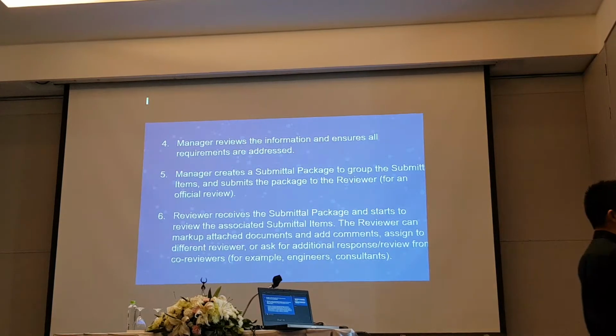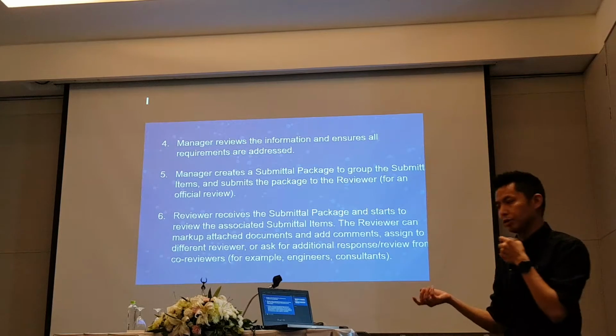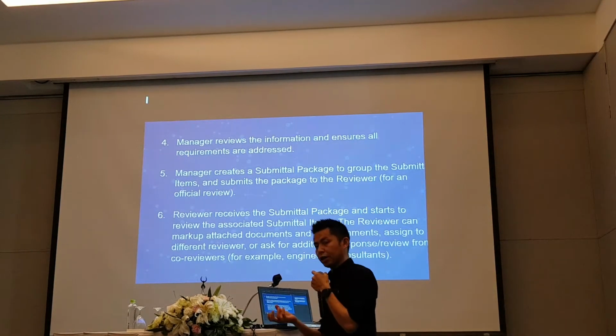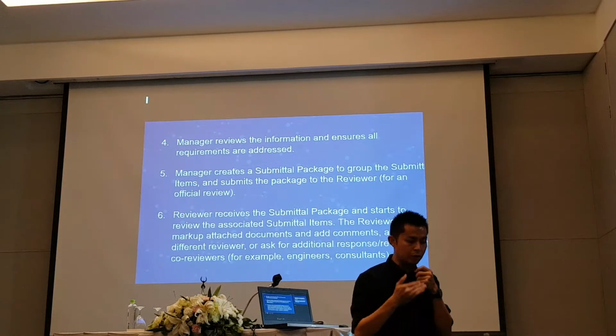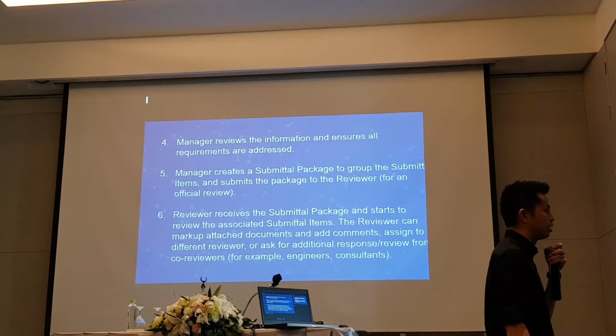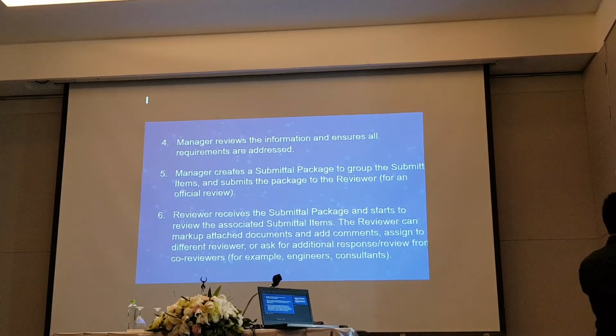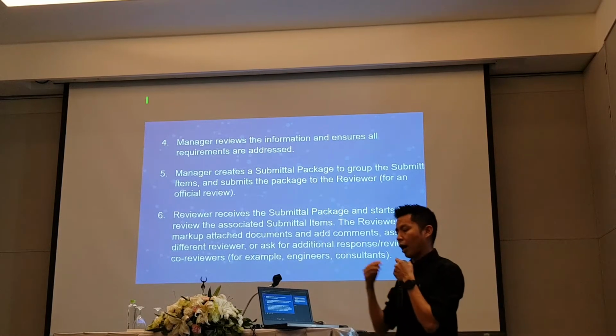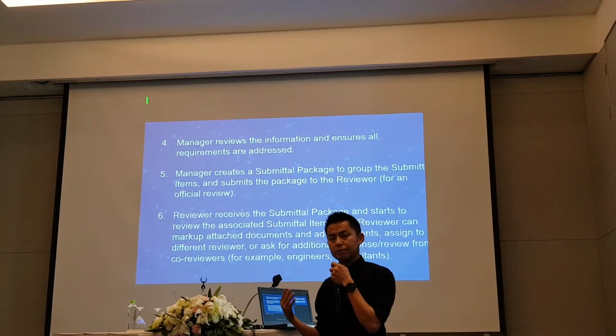This package will contain all the submittal items and be sent to the reviewer. The reviewer will review the package. Of course, you can have the co-reviewer at the bottom there. I will not really go into details on that one. By the time it's done, the reviewer says, hey, everything is in order, I will just approve this package.